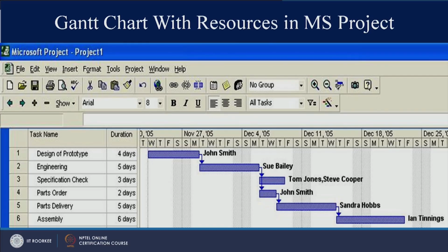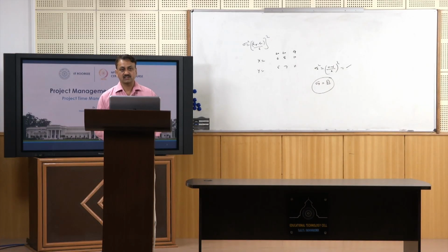And you need to also look at resource availability. So, in fact theoretically when we say that this activity will take 5 days, in real life it may take 10 days, right, because of non availability of resources, or non availability of one of the key members, or due to holiday and some other reasons, right.